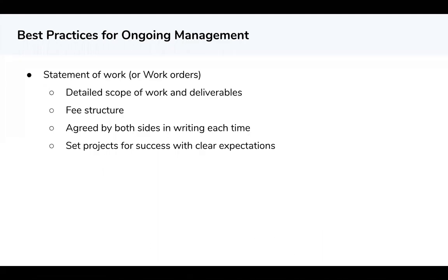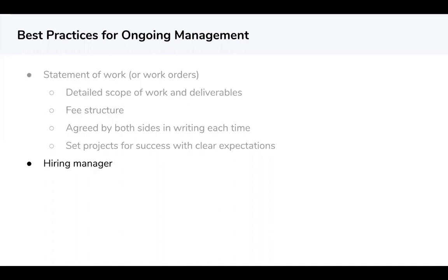As we talked about, you want a statement of work, or as we call it, a work order, similar to a purchase order, done each time you start a project. This is where you write out a deliverable and the fee structure. We highly recommend that you have it agreed to by both parties each time in writing, to set the expectation up front and ensure success of the project.